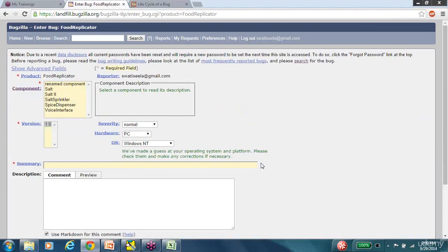Gain is normally, ideally I'm telling you, it's not adding up in this case, but ideally gain is when you are supposed to finish a job in 24 hours, you've done it in 18. In that case, the gain is 6 hours or 25%. So the gain is nothing but how much ahead you finished and how much time we saved as a result of that. It's not adding up here, I agree with you. We'll have to do some research on that. So see if that's happening for other issues also, and let me know, please. So that's how you create an issue and do the bug management process.